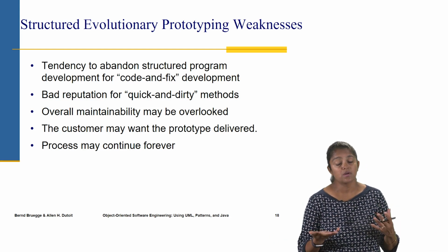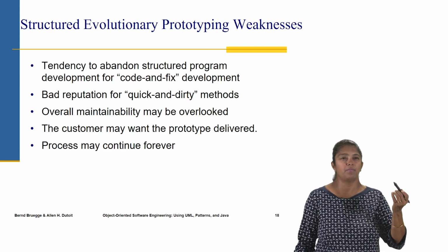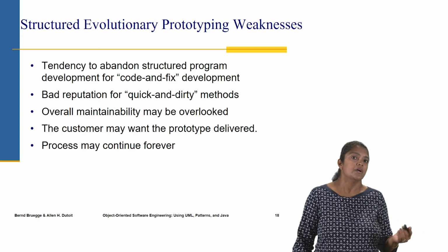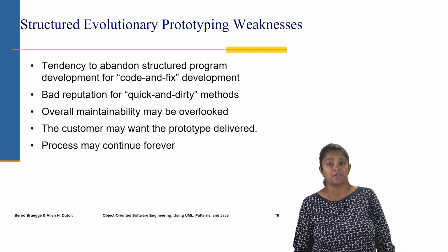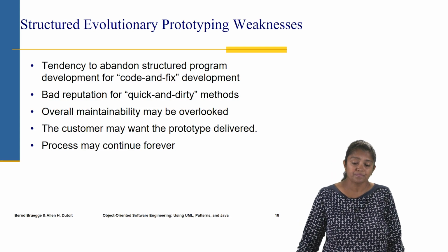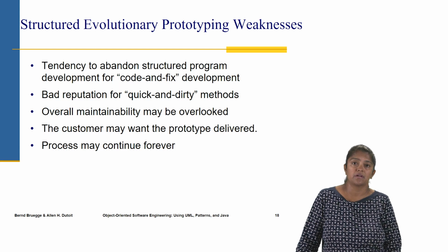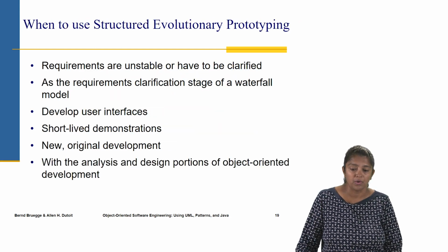And then there is also this risk that this cycle of producing the prototype, getting user feedback, and going back and making changes might continue forever if the customer is not satisfied. So that's a risk as well. So these are some of the weaknesses with this structured evolutionary prototyping model.